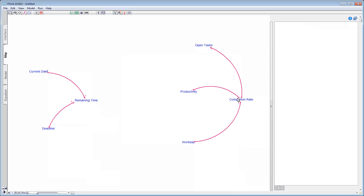It's obvious that the higher the productivity is, the higher the completion rate will be, so I add a positive polarity.